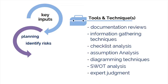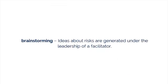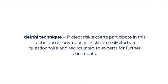The next tool is information gathering techniques. There are lots of ways to gather information. Brainstorming is always good, and so is interviewing project stakeholders, participants, and subject matter experts who may have insight into potential risks. One alternative to brainstorming is called the Delphi technique, in which a project manager solicits opinions and advice from people and then includes that information anonymously with the other documentation of risks that have been identified. One benefit of this Delphi technique is that it makes brainstorming sessions available to people who may be located elsewhere geographically.